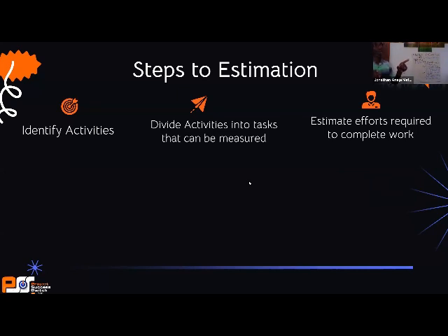And most times I advise people to assume that only 80% productivity is what you will get. So this is where you do all that. You just assume, even if they tell you they can lay 300 blocks per day, just assume that their productivity will drop by 20% and just estimate 80%. So when you are calculating your own duration, you use 240 instead of 300. It helps you to come up with realistic estimates. Even if something happens and they feel a headache and take 1 hour off, you can easily still cope.